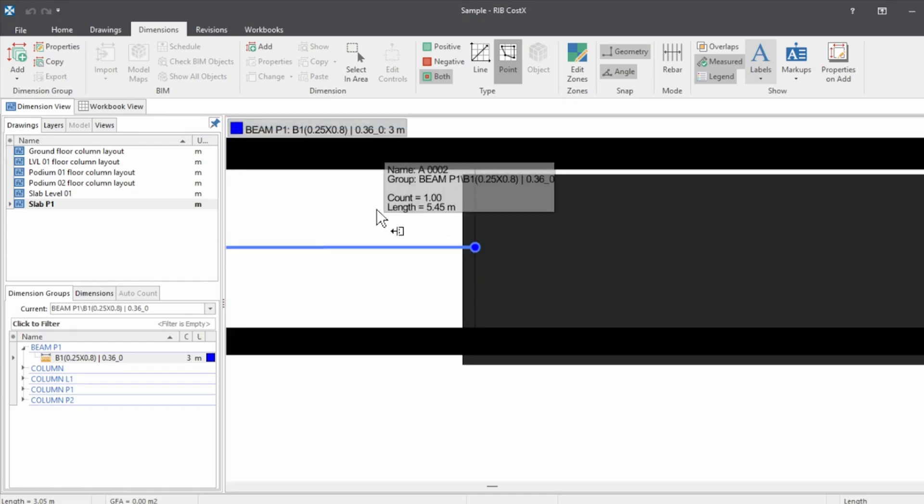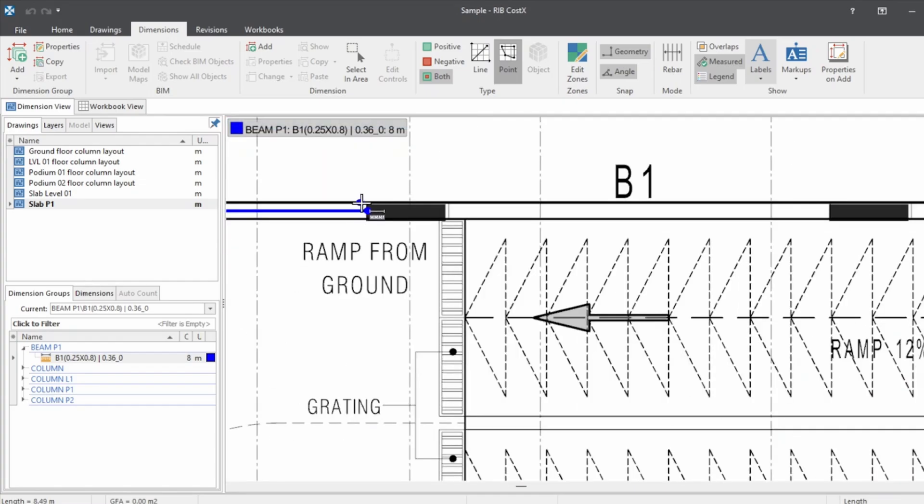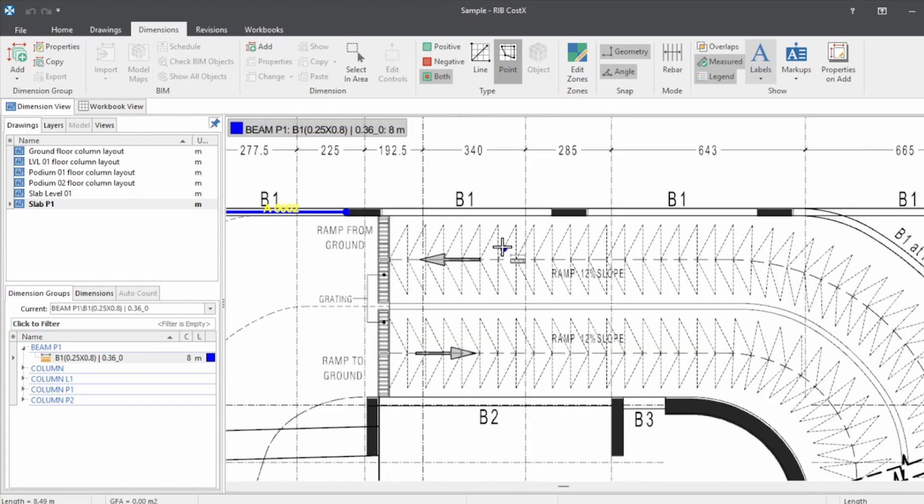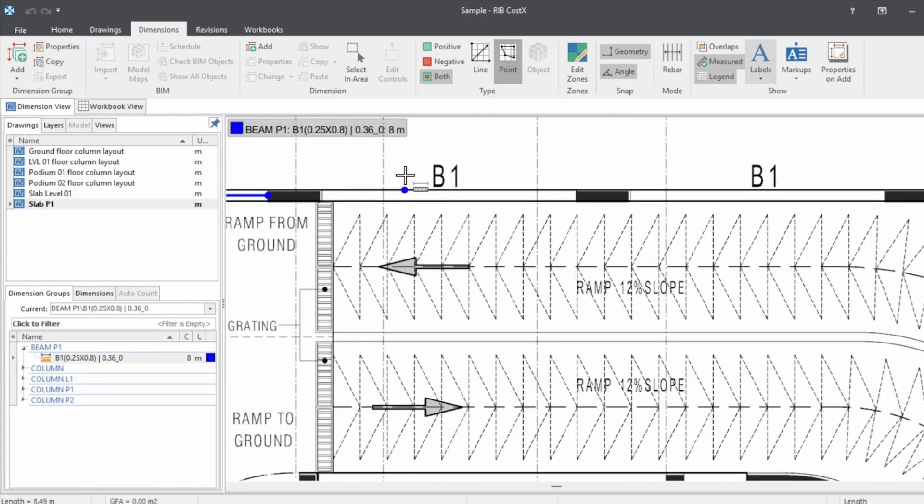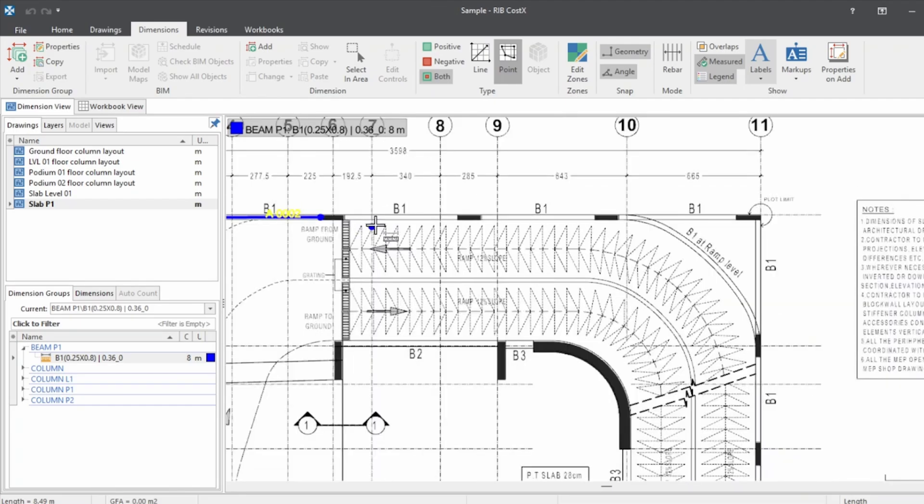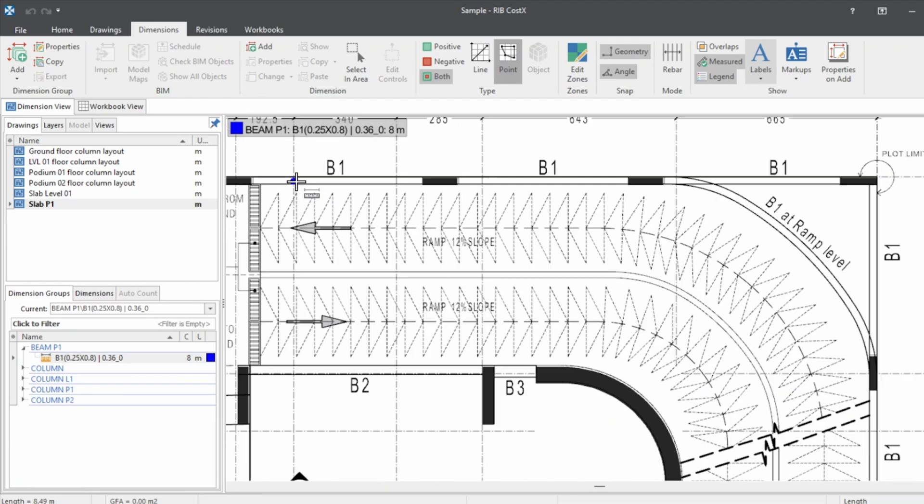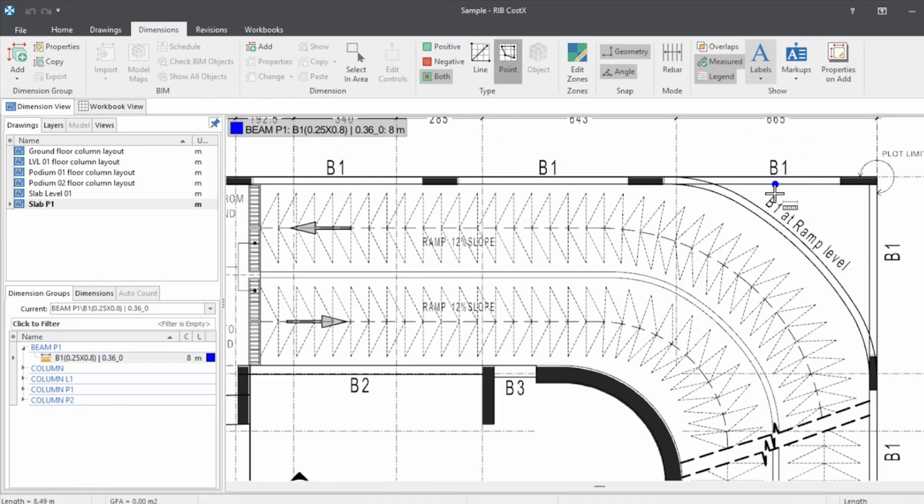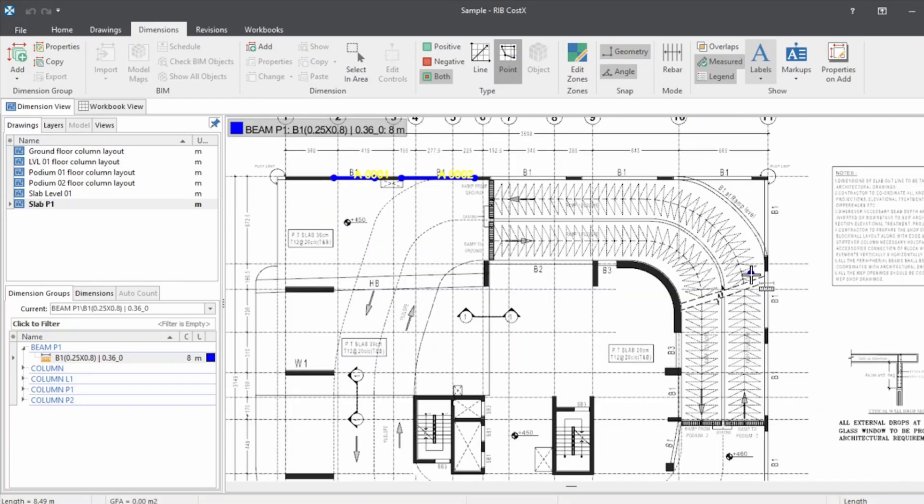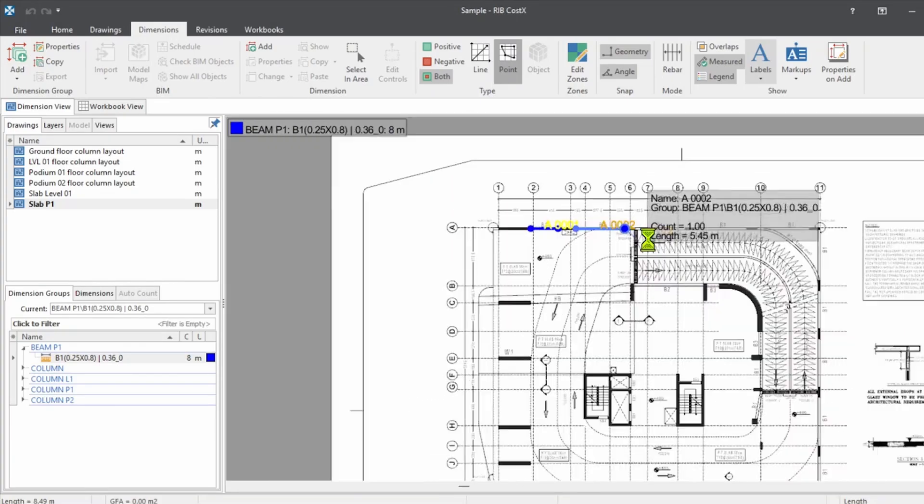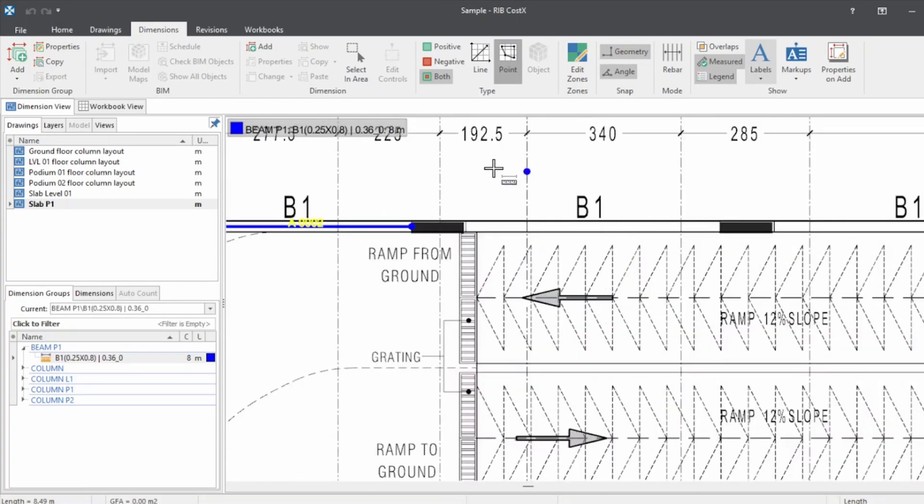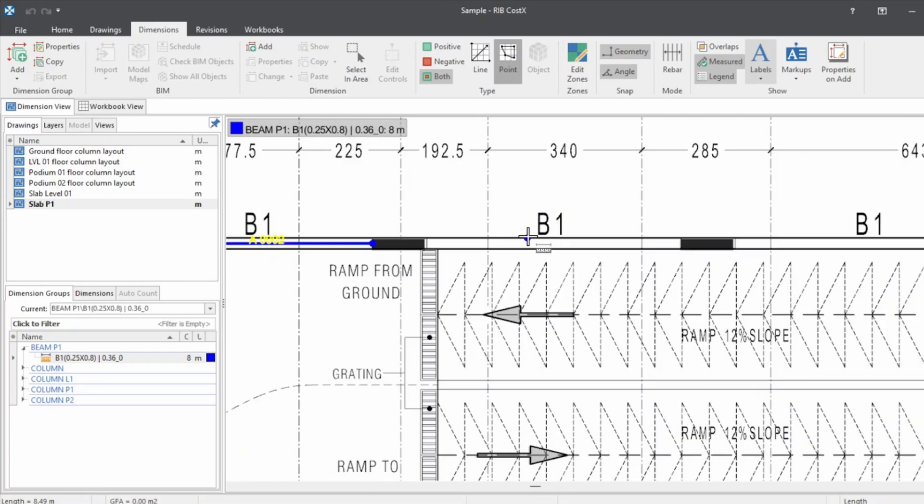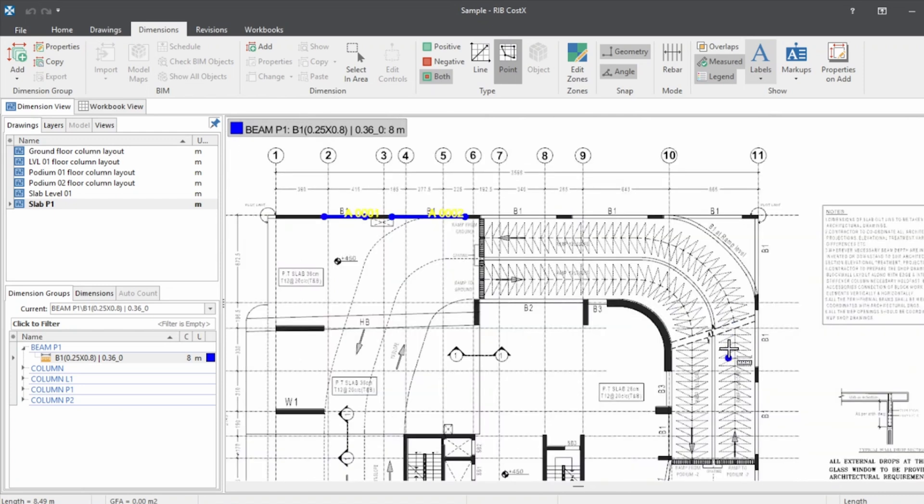Now I start marking the beams, just by single click I can mark. So B1 goes for the same level. Here you can notice this is a ramp slab. So here, this beam, we will provide both side shuttering. So there is no slab on either side, which means we have to change the description of the beam. So this side is 0, this side is 0, this ramp, so it goes like that.